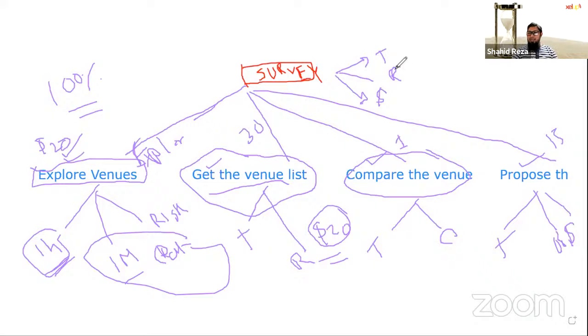And also we can easily identify what type of resources we need to do the project's different activities and how many of those resources we need. And we are also getting the dollar value. That means we are getting the project cost also. When we add up all the components, all the costs of all the activities and work packages, what will we get? If we add everything, then you also get the budget of the project.